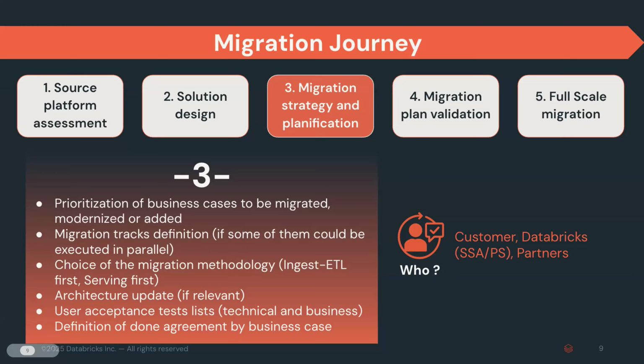What does that mean and how does this help us during the architecture design? This helps us primarily to establish early feedback loops. The way it typically works is after the wave is accomplished, we have the user acceptance testing and the validation, right? So we establish the feedback loop again with the users of the platform, with the future users of the platform. And we incorporate these learnings without waiting until the very, very, let's say, waterfall-ish execution of the migration when we have the validation and UAT phase. Again, this helps us to adjust the planning on the fly as needed during the migration execution.